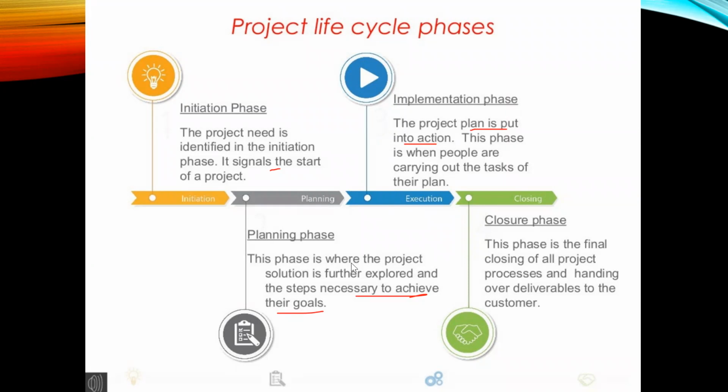Finally comes the closure, which is the final step of every project. The closure phase: when do you know that the project is over? First of all, when we deliver the project successfully to the customer or to the manager, handing the project to whomever was requiring it. Yet afterwards, I'm going to add a step, which is, in my personal opinion, very important. The project should end whenever the review meeting is done. So every project should have a review at its end, collecting feedback, putting the dots on everything that happened throughout the project.